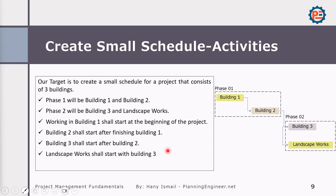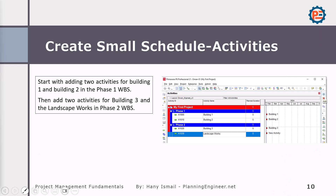Our target is to create a small schedule for a project consisting of three buildings. We have Phase One with Building One and Building Two, and in Phase Two we'll have Building Three and landscape works. To do this in Primavera, we simply add activities under each phase — Building One and Two under Phase One, and Building Three and landscape under Phase Two.